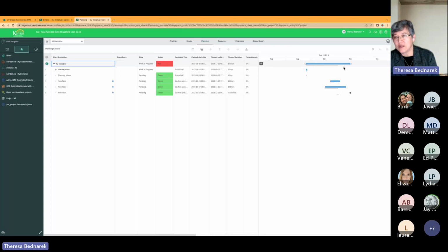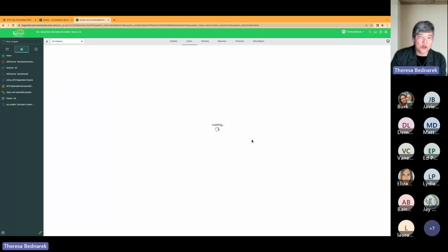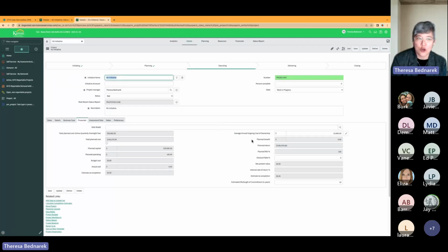So now you know what the difference was between what was planned, and these are the dates that you've now been approved to include on your project plan. You can see that the milestone date has moved over. It was originally over here. This task was originally this duration, and now it's up to here. Same for here. No change for these tasks here. And that's recast. Any questions on recast requests and creating the baselines that go along with it?